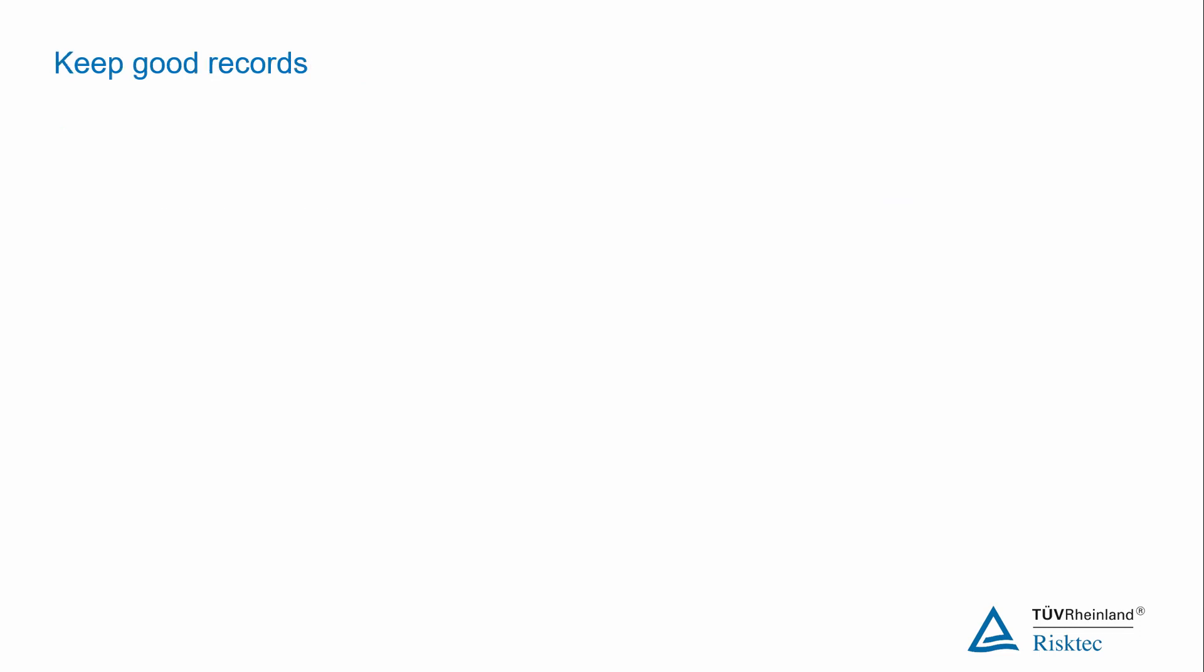Keeping detailed, accurate records of the workshop is essential. Never trust things to memory. Always write them down during the workshop or record them in some other way. If you choose to take notes yourself, you've got more control over how things are recorded. But you then run the risk of missing an important point if the discussion continues while you are writing down what has just been said. Employing a dedicated scribe to take notes frees you up to facilitate and ask all the questions. But not everything may always get written down as you would wish and you might find yourself yelling instructions across the table at the unfortunate scribe when you should be facilitating the session.